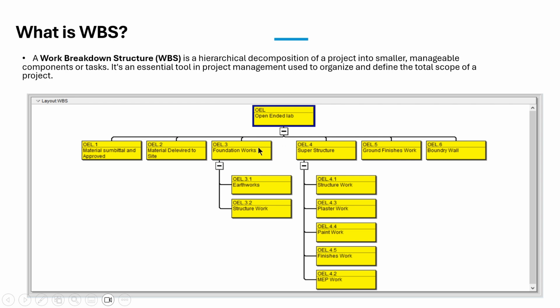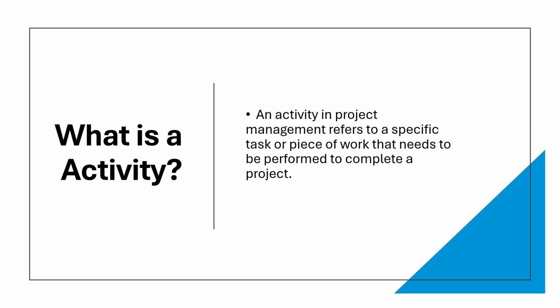Then we divide these work packages into subdivisions. In foundation we have earthwork and structure work. Also in superstructure we have structure work, plaster work, paint work, then finishes work, then MEP work. So when we divide our project, it is easy to manage and handle.